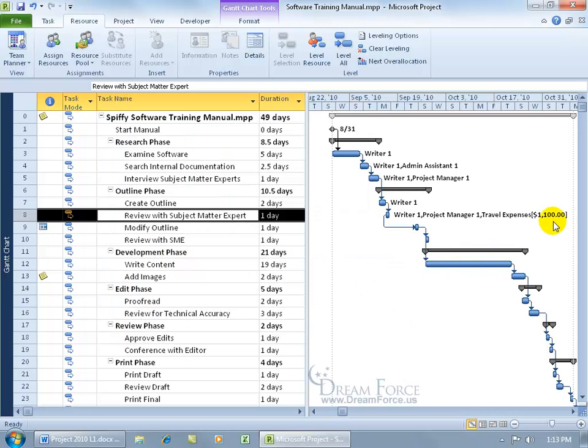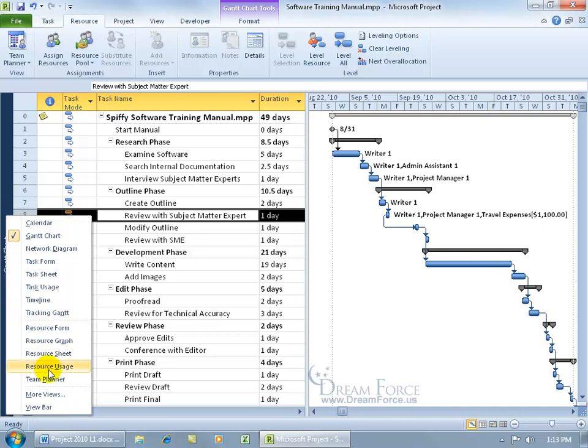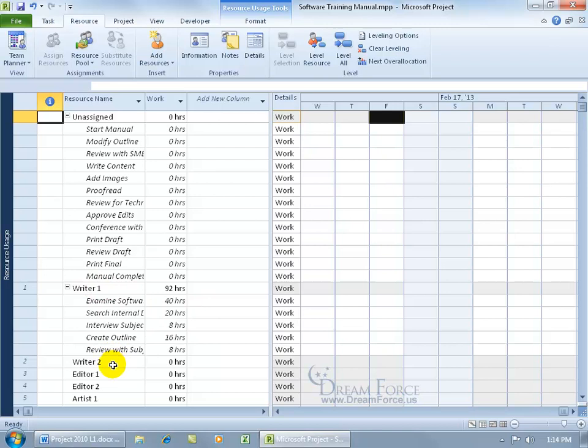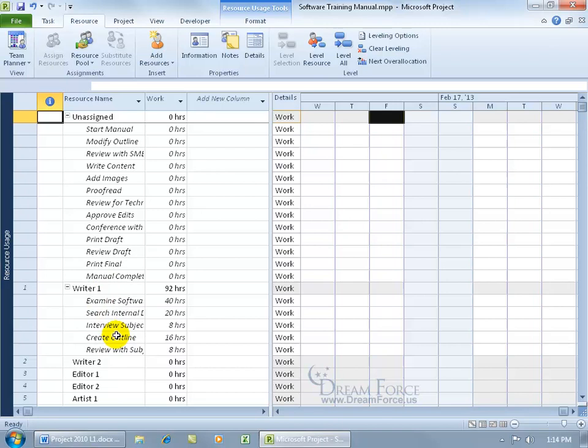Updates to $1,100, or another way to do it is to come over here and we can change views and right click on the view bar and go to the resource usage view. Now I'm going to hit two birds with one stone. I'm going to show you a different view that I think will be helpful, and also how you can do it in that view, in other words, change the travel cost that's been assigned to that resource. So in the resource usage view, see if this makes sense. It has a list of all the resources, Rider 1, Rider 2, and so on, and it shows whether or not that they're being used. Now those resources that haven't been assigned to a task, or unassigned tasks here, are all listed there, and those resources that are assigned to a task have the tasks listed below that resource. Kind of cool. A different way to look at things in order to have them organized.